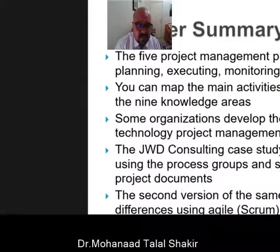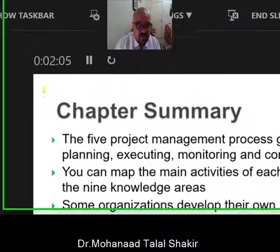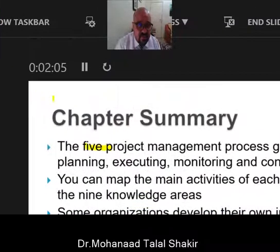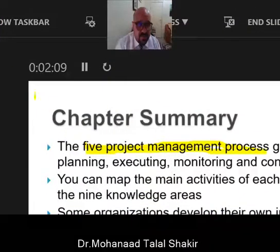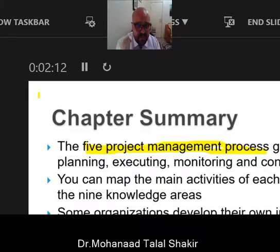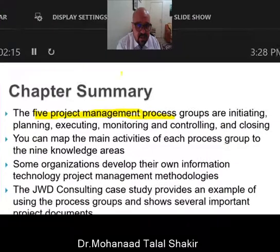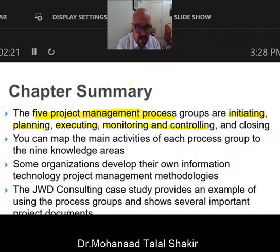In the Chapter 3 summary, we have 5 project management processes: pre-initiation, initiation, planning, executing, and project closing. More completely, these are initiating, planning, executing, monitoring and controlling, and closing. You can map the main activities for each process group to the 9 knowledge areas.